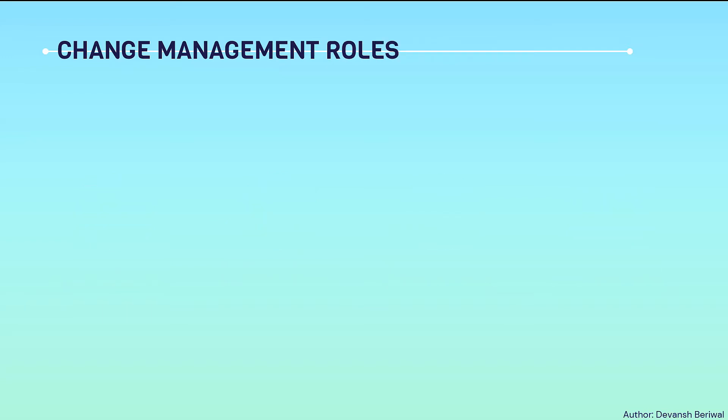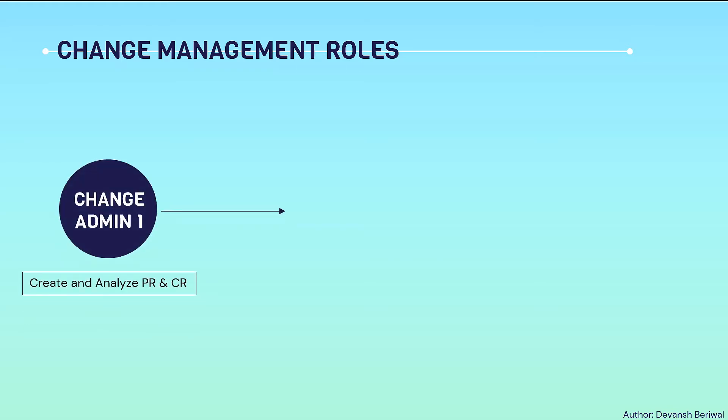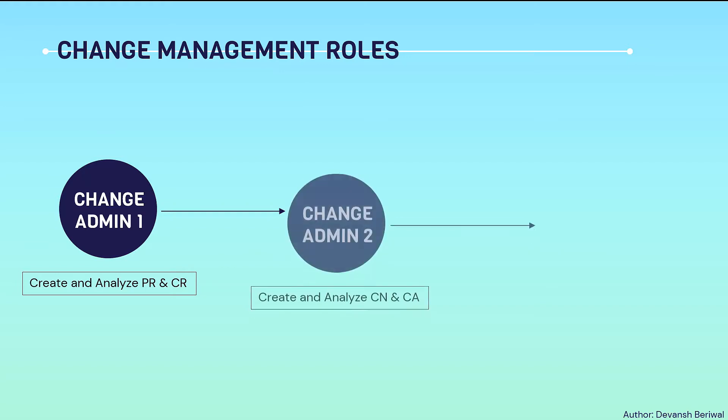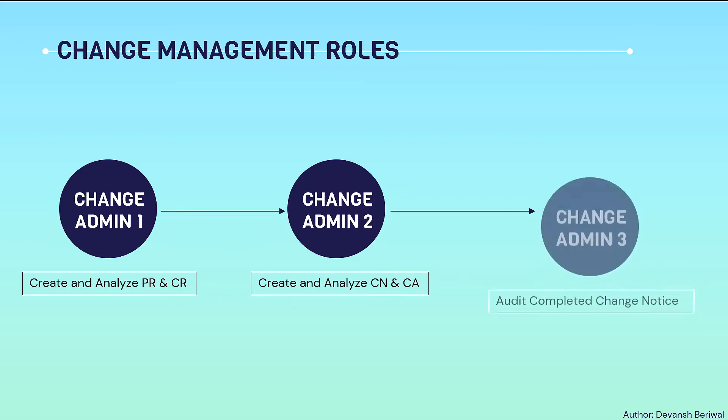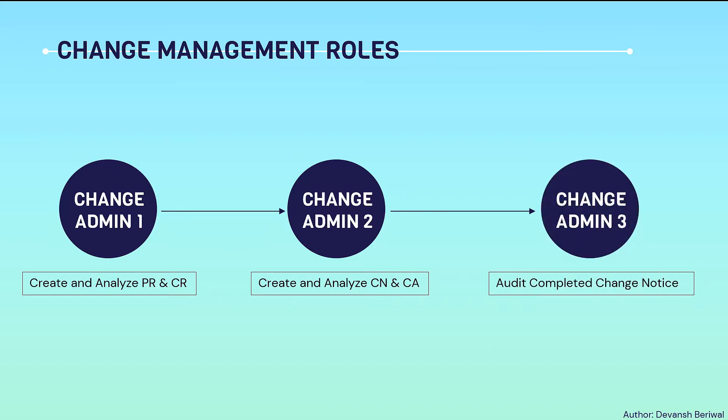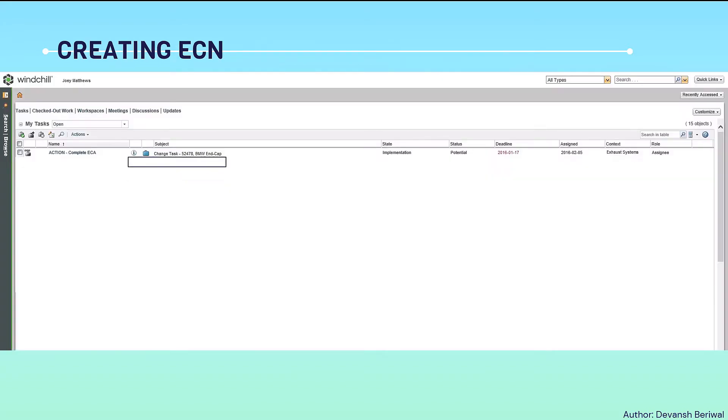There are some predefined change management roles in Windchill. For example, change admin 1 is authorized to create and analyze a problem report and a change request. Change admin 2 can create and analyze a change notice or a change activity. Change admin 3 audits the completed change notices and releases them in Windchill.